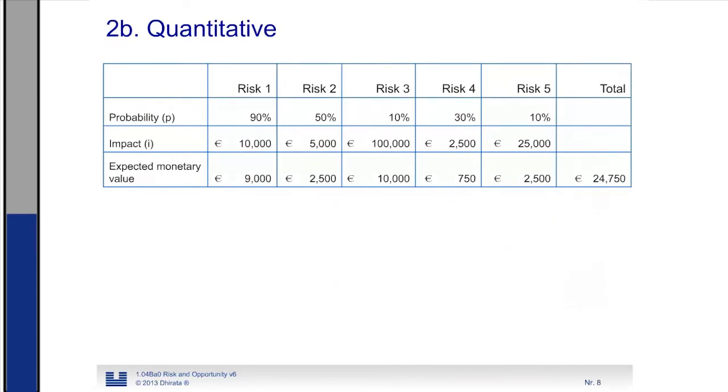Here I have written down an example of a quantitative analysis. We have five risks, risk 1, 2, 3, 4 and 5. And for each of them we have analyzed and we come to the conclusion that the probability is 90, 50, 10 or 30 and 10%. We also investigated the impact that it would have when this specific risk would occur. And then we calculate the expected risk value or the expected monetary value. And this is the probability times the impact. So here you see for the whole project 9,000, 2,500, 10,750 and 2,500.